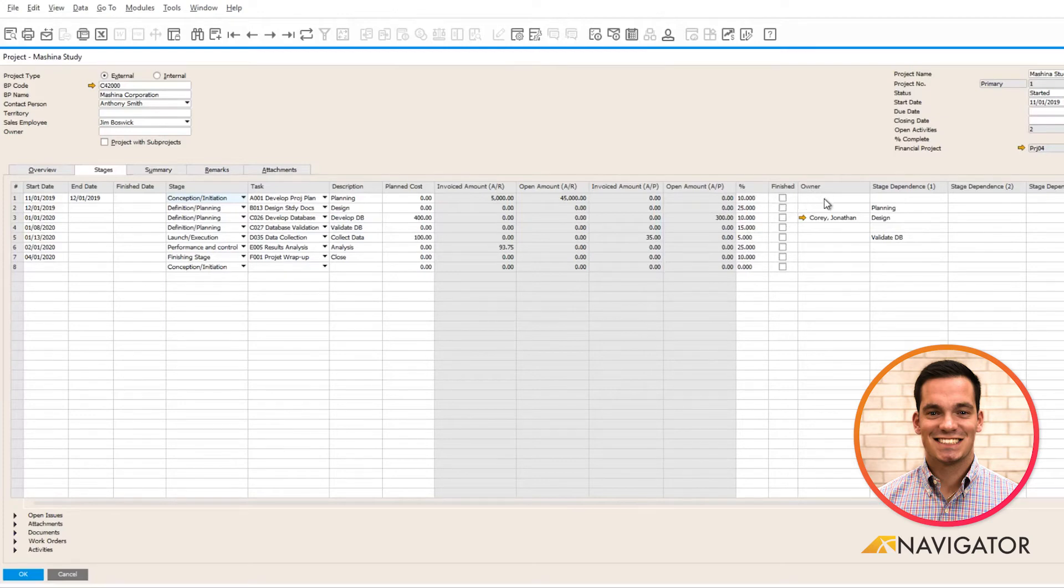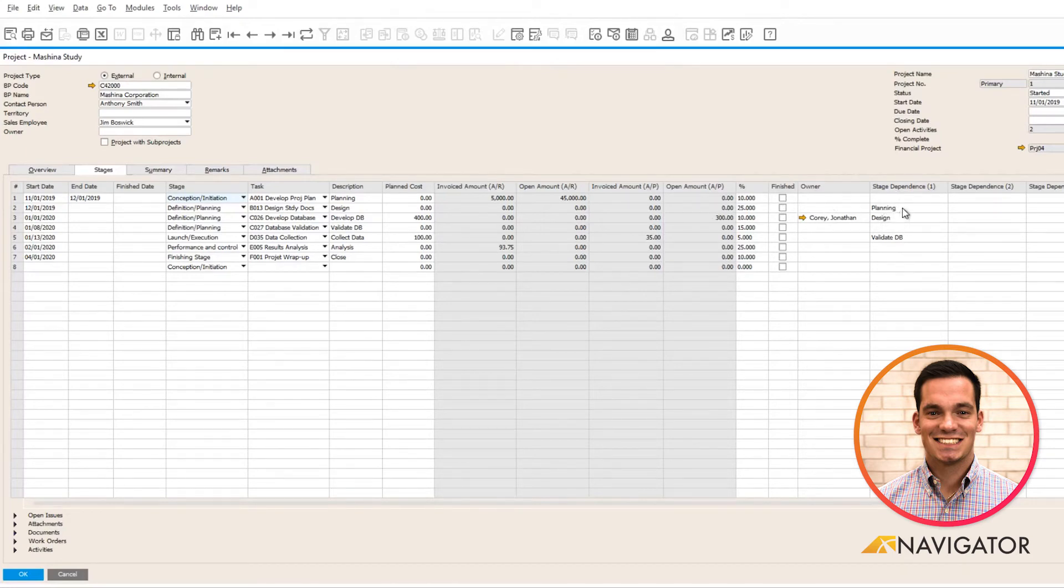Every stage has the ability to have a document owner as well, and stage dependencies are available too. So I can't start stage two until stage one is done. That's what that means there.